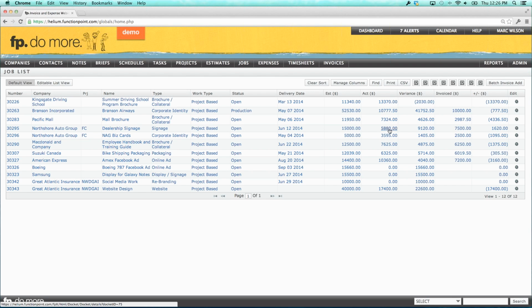Maybe my scenario here is we have reached a milestone. We've provided the client with our close to final design for the signage, and they've signed off on the fact that we can bill them another 25%. 7,500 is half of 15,000. We're going to bill them another 25% because the client has let us know that, hey, we are now ready to pay you another 25% based on the fact that we're happy with these designs, and we get that you guys are three-quarters of the way done.